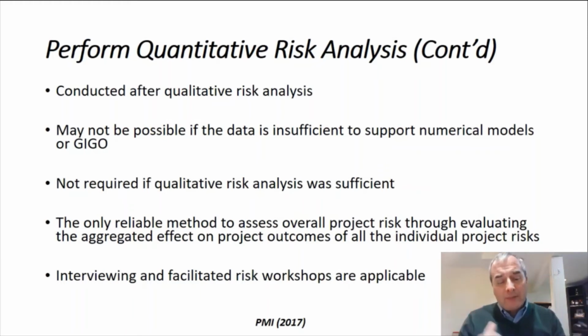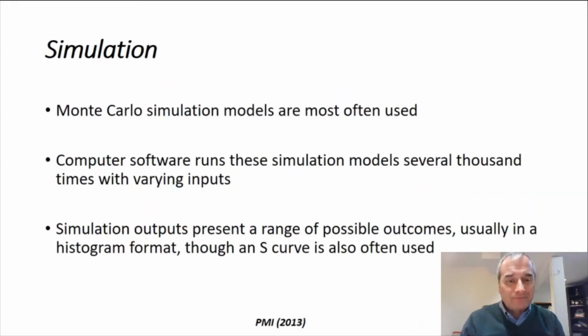Now, the only reliable method to assess overall project risk through evaluating the aggregated effect on project outcomes of all the individual project risks is quantitative risk analysis. This is the only way to do that. And interviewing and facilitated workshops are highly applicable to help facilitate your quantitative risk analysis.